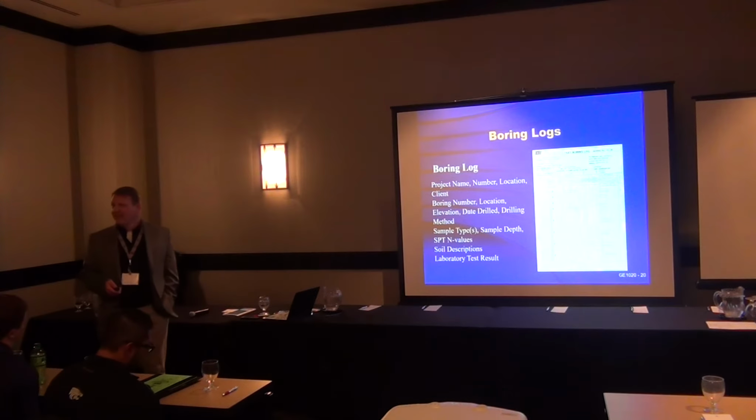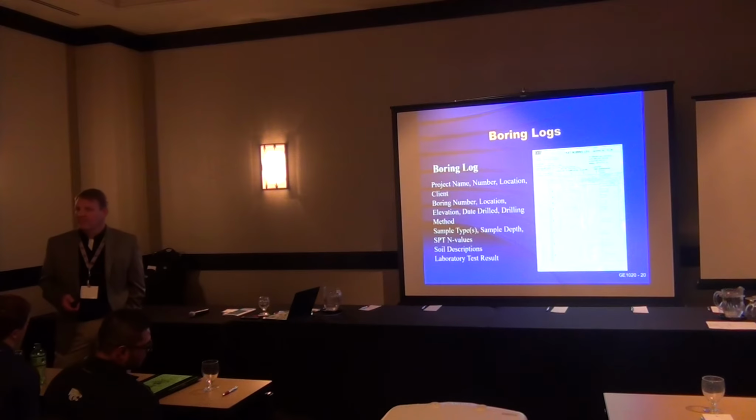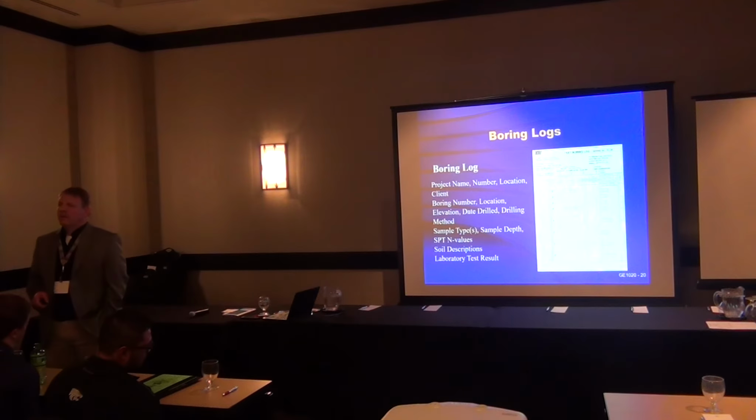But don't you think maybe that's the good thing to do? Because of the way he asked the question, there was one project I heard about recently in Texas, and the geotechnical report came out, everything is good, clay soil, none of that geotechnical report mentioned the sulfate in the soil. Here we go, boom, mixed with the cement. My blade man starts saying, according to my grade, I hit the grade, but after a couple hours, the thing is almost 1 inch. I need to go and cut 1 inch.